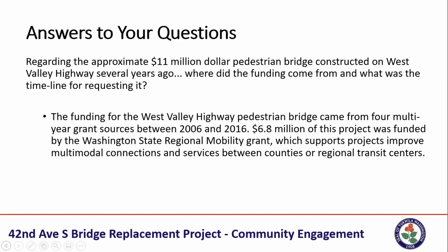And can I ask also, something that you might want to look into is, you talk about putting down a temporary bridge next to the 42nd Avenue Bridge while you do all these things. Have you been out here to look? You'd have to run through the Tukwila Community Center Sprinkle Park to stick a bridge there. There's not room to put a bridge beside the bridge while you work on a bridge.